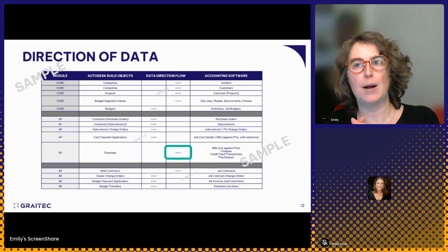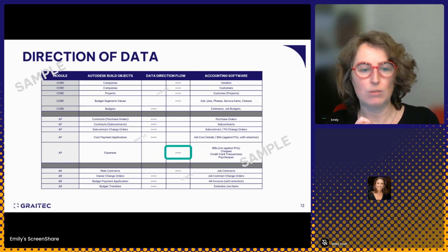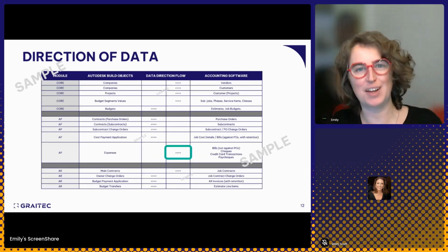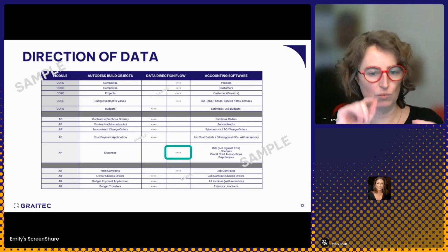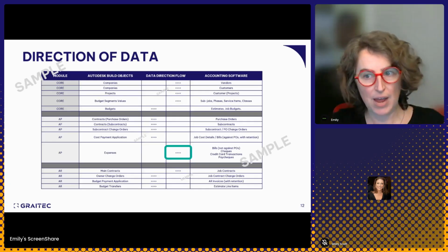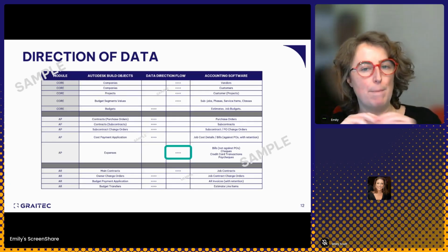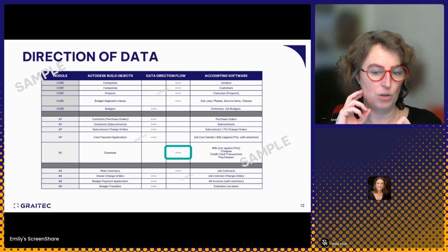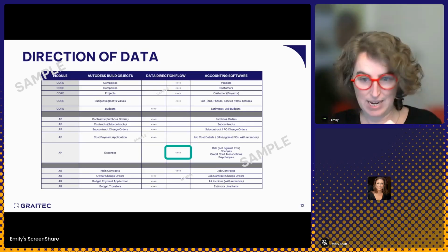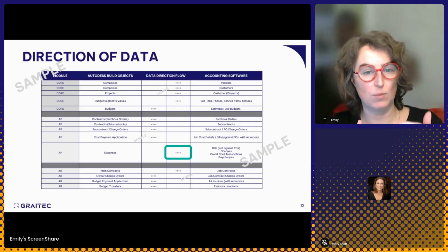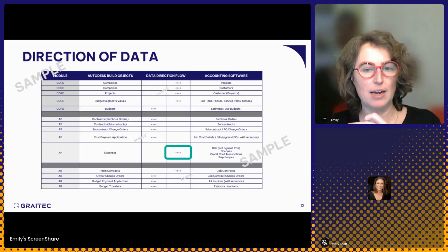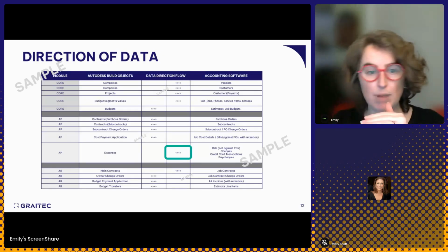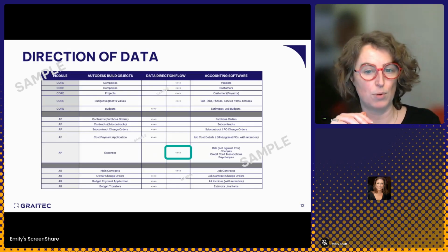They now have a feature that allows you to reforecast. They've had it for a little while, actually, frankly. It's almost a year now. That allows you to reforecast that line item based on actuals that you've incurred, so that if you're spending less than what you anticipated on that line item, okay, then I can reforecast that line item and see my potential savings across the board.